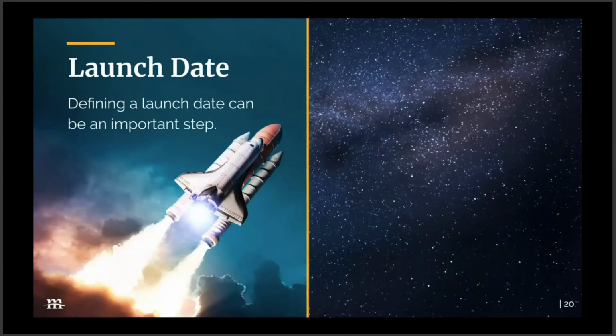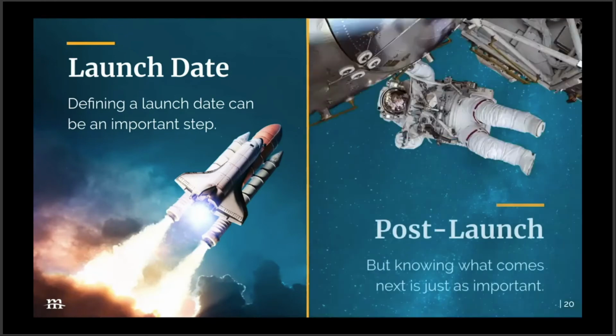It also helps you force rank what you want to get done when it comes to building out requirements during the project. And don't forget at this point to start thinking about the post-launch roadmap. The roadmap doesn't have to be too detailed. You want to earmark some of the budget for at least 6 months of post-launch sprints if your budgets are approved annually. It'll put you in a much better position to reap the project's maximum value over time if you start addressing post-launch early on in the budgeting process.